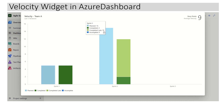In Azure, if there are work items, user stories, or bugs that have been updated or marked as closed or completed past the sprint duration, Azure will treat them as completed late. For example, if there was a sprint ending on the 15th of July but the team updated the work items after the 15th of July, even though they completed the work it will be categorized as completed late. So from this chart we can clearly see what has been completed on time within the sprint duration and what has been completed late.